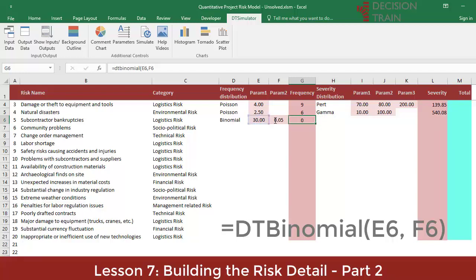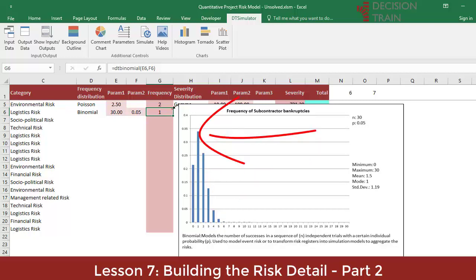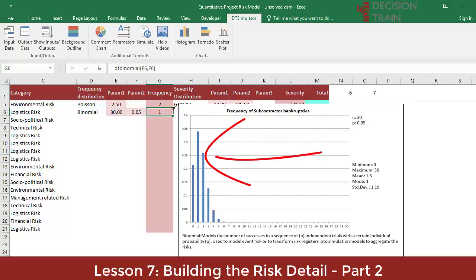Insert the two respective parameters: N equals 30 in cell E6 for the number of subcontractors exposed to risk, and P equals 0.05 in cell F6 for the individual probability of bankruptcy. When positioning the cursor on G6, the respective graph will be seen. The binomial models the number of successes in a sequence of N independent trials with a certain individual probability P. When looking at the graph, it is observed that there is a 22% probability of no bankruptcies, about 34% probability that exactly one bankruptcy occurs, and about a 26% chance that exactly two bankruptcies will occur.